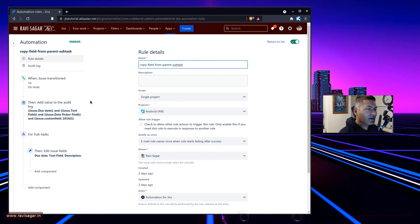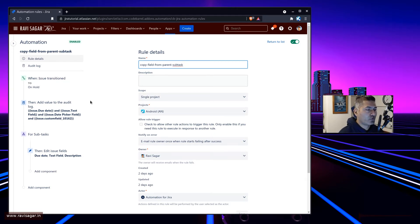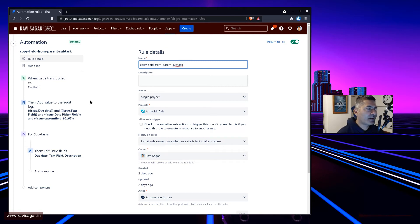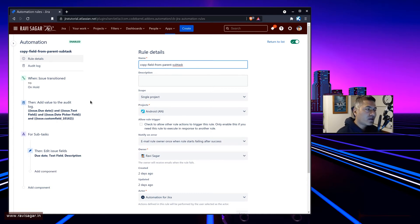The idea of a subtask is to break down a parent into smaller pieces — when you have a big task or activity and you want to break it down, you create a subtask. That is the original purpose of the subtask issue type in Jira. In those cases, you are inheriting information from your parent. When I say inherit, I don't mean Jira copies field values automatically — it won't do that for you — but you can always go to the parent, or fetch the information programmatically. If you want to also see those fields in your subtask, it can be done using automation.